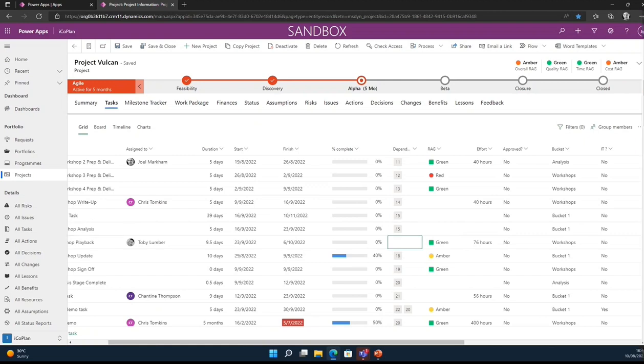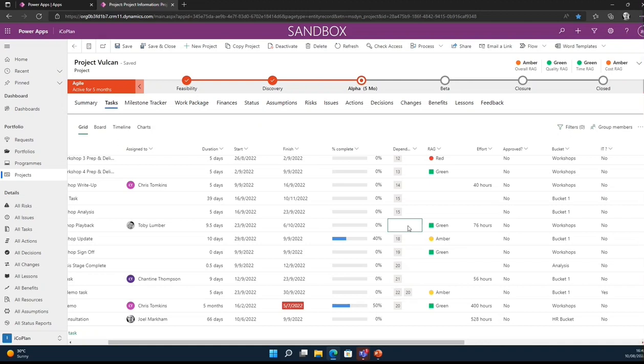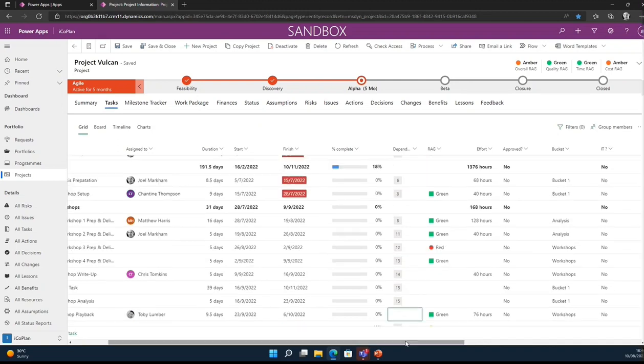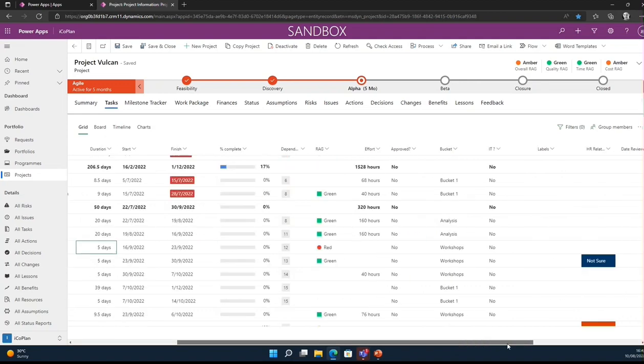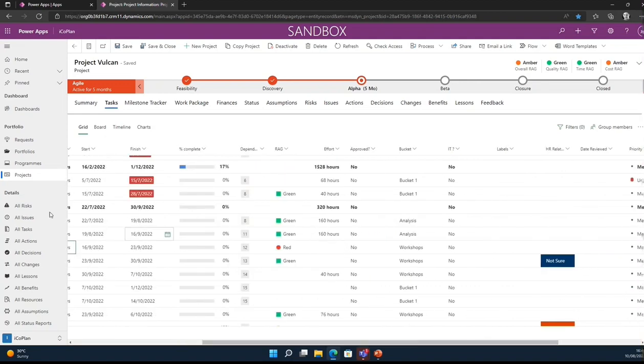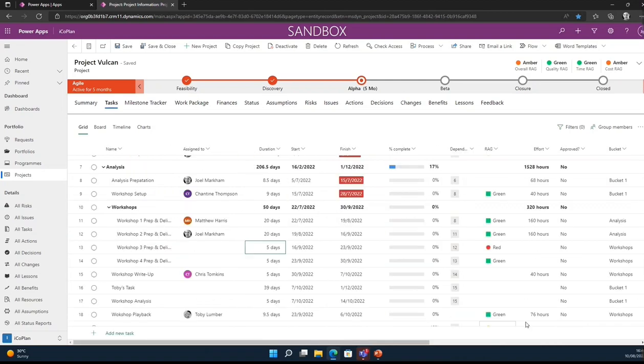I think it was, apologies, it was Lisa earlier that asked the question. So you can see I've linked all my tasks together here because I like them all to flow through. So if I'm moving one project out to the right a little bit, all my other projects it's dependent on, he says, frantically trying to find one that he's done earlier, all these project finish dates are moving out to the right at the same time. You've got effort attribution as well, so you can start to say that actually this task is going to take 42 hours of effort and so on and so forth.